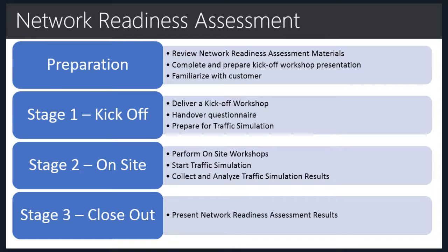In stage 3, which is the closeout stage, you'll be done analyzing the results from the traffic simulation and from the on-site workshops, and you'll be using that information to create a closeout presentation. That closeout presentation contains all the recommendations and all the things that you will be telling the customer they need to do to be ready for the Skype for Business deployment.